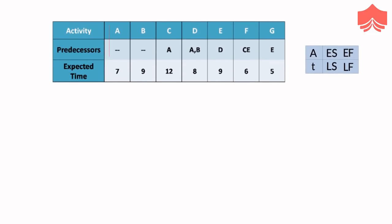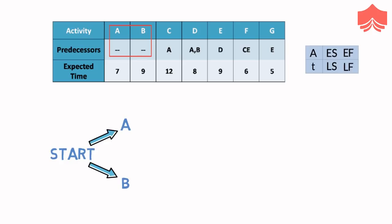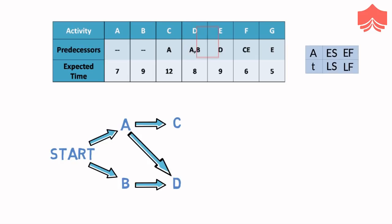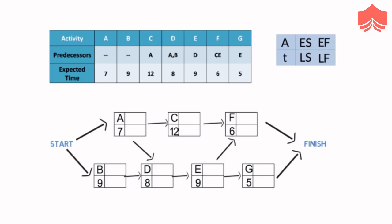Suppose activity A and B are without any predecessors, therefore these activities can begin at the start of the project. Activity C needs A to be complete before it can start. D requires both A and B to be completed. E needs D to be completed. F needs both C and E to be completed, and G requires E to finish first. Since there are no activities after F and G, both of them can go to the finish. This is how the network will look with activity nodes.